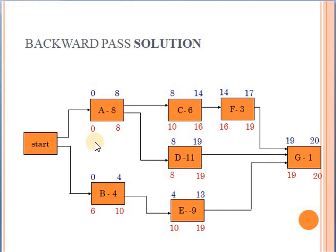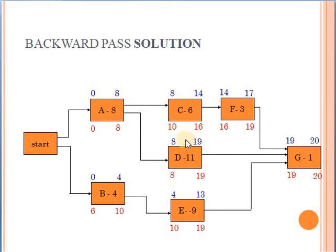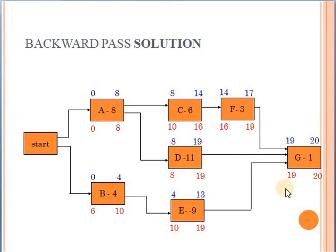Looking at the other activities: for E, the difference is 10 minus 4 equals 6, and 19 minus 13 equals 6 — so we can delay E by 6 days as well. For D, the numbers above and below are the same, so D is critical. For C, the difference is 10 minus 8 = 2, and 16 minus 14 = 2 — so C can be delayed by 2 days, and F as well. However, G cannot be delayed. So the critical activities are A, D, and G, and this is your critical path.